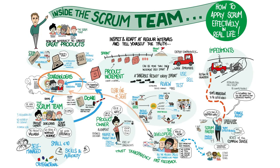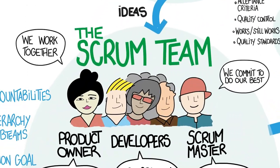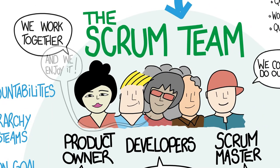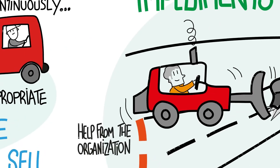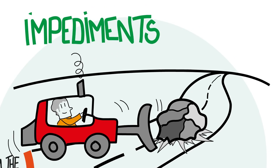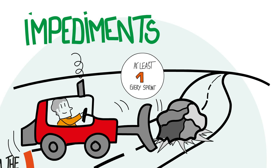A Scrum team is a happy team. If your team is not happy doing Scrum, that is a warning sign that something is amiss. The goal is not to cram more work into each sprint — the goal is to produce more value sooner. Listen to your team and address at least one concern every sprint.